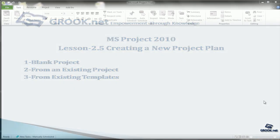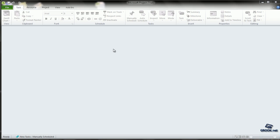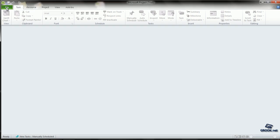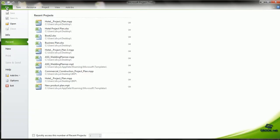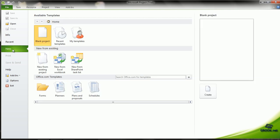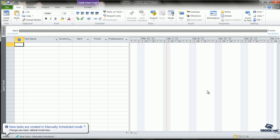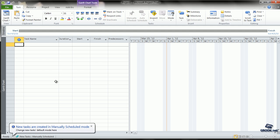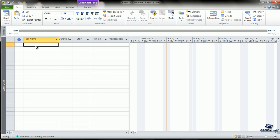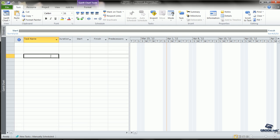To create a new project, we go to File, which opens the backstage view. We click New. The first icon shows blank project. We click on that and then select Create. This makes a blank project template for us. We can start entering the task names and the various properties for the tasks and start making our project.